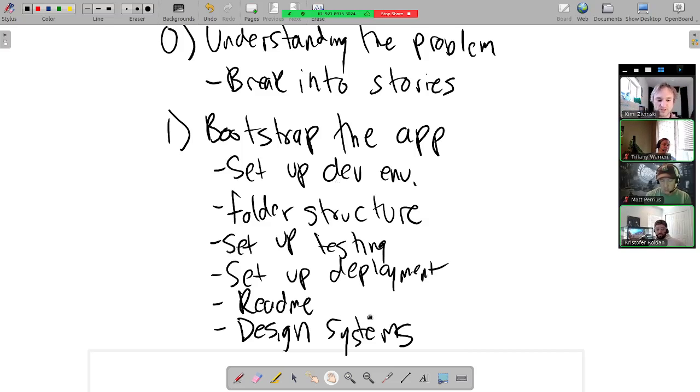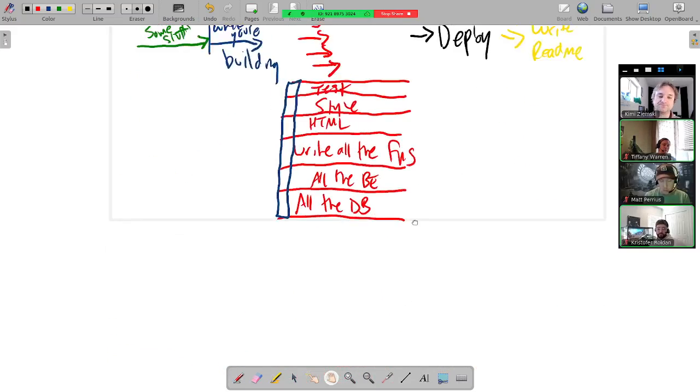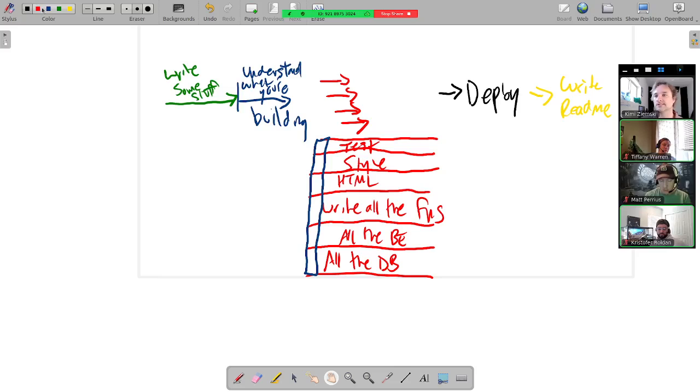Really good question. So here's the reality of this. If I'm a user and I want 10 things, and you give me all of 3 of them, I'm in much better shape than if you give me a working database and a backend and some functions for the whole app, for all 10 of them. That's nothing. This is 3 things. This is 0 things, effectively.